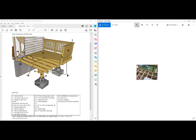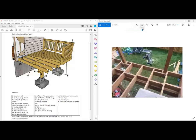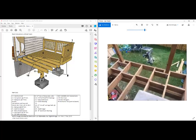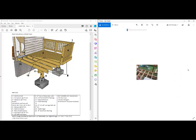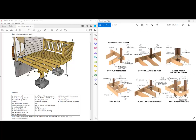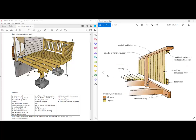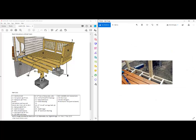From there, we can set the handrails. We're going to use one of the techniques approved by SB7, the Ontario Building Code documentation on posts and installation of posts. Whether we use a technique like that or any of the ones that are indicated similar to this, you have to refer to the SB7 documentation to get it absolutely correct. We're setting these posts. That needs to happen once those joists are in place, the rim board's in place, we can set the posts. Then we can set the handrails and the pickets and the top rails. We have the three different elements that are here. While we're setting this - these are tasks number 18, 19, and 20 - we can actually be installing the deck at the same time. The deck installation task number 21 can be occurring before the completion of the handrails being installed as well.